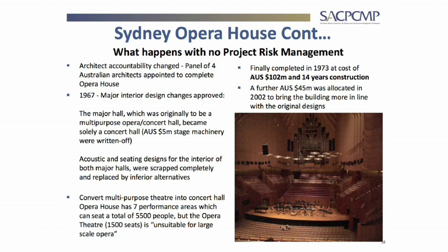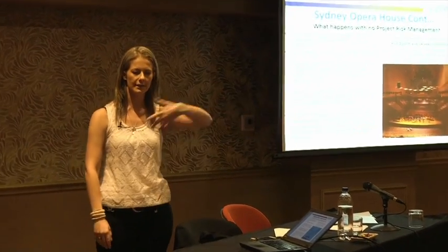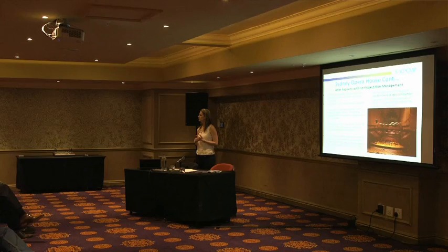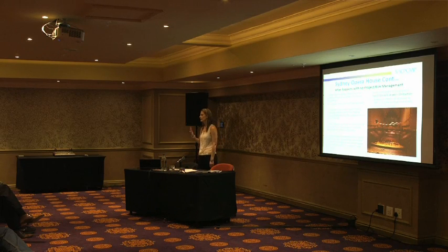Because if I would start building a house and all that needs is the roof and the chimney, and they say, well, we don't want you to continue building the house, we're going to get somebody else. And then for some reason, 5 years down the line, the structure of that house fails. And they come back to me, I'm going to say, well, I'm not the last guy who worked on your house. So I don't know when they put on the roof if they've put the walls or the integrity of the walls at risk, so I'm not going to take liability. The same thing if you replace engineers on a project, you can't hold the first engineer liable or accountable for anything thereafter. That becomes the new engineer.